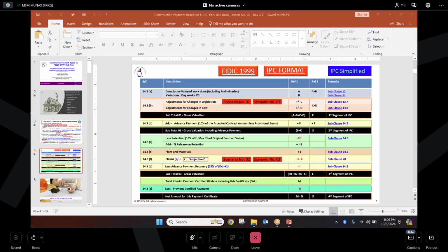This is only the case where you are searching for a rate. It is in the case where you already have the BOQ rate. Let's say brickwork, blockwork or floor tiling, whatever, the rate is available in the BOQ. But sometimes you cannot continue with the same rate because it will fall under 12.3A, which is the varied rate, where the quantity increases and the amount is multiplied by the quantity and the rate is increased more than 0.01 percent of the accepted contract, or change in the quantity.